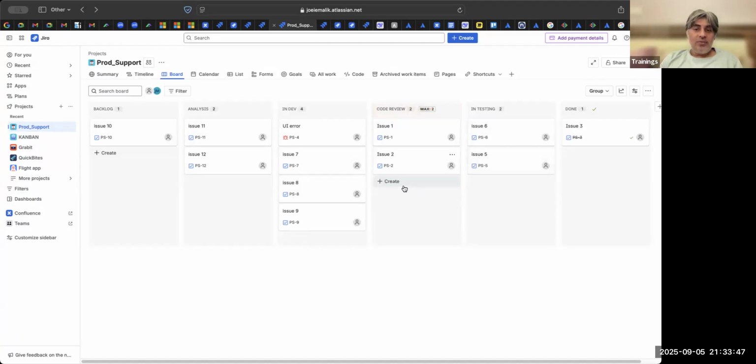Now this is fine, but still he has 2 code reviews. He is doing it. Now one of the other developers finishes his bugs. He wants to push it to code review. A red alert: I cannot. So he moves it back. So this way, there is no pile up here.